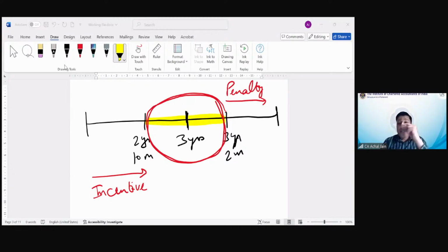Kasak is asking, then sir, if there's a penalty, let's suppose, then what do we do? You will reduce the amount, because by penalty, the contractor will not be paid. So 5 crore, to the extent of the penalty, will go down. So you'll have to subtract the amount. Currently, if you look at the solution, you have added all of these amounts. But for penalty, you will have to reduce the amount of the contract. Yeah, because penalty is the amount by which the contractor will not be paid. In fact, it will be charged from the contractor.